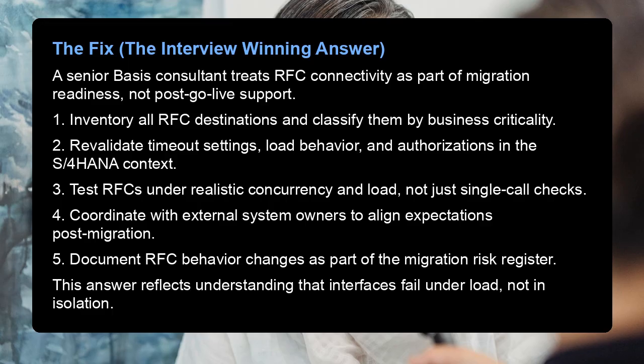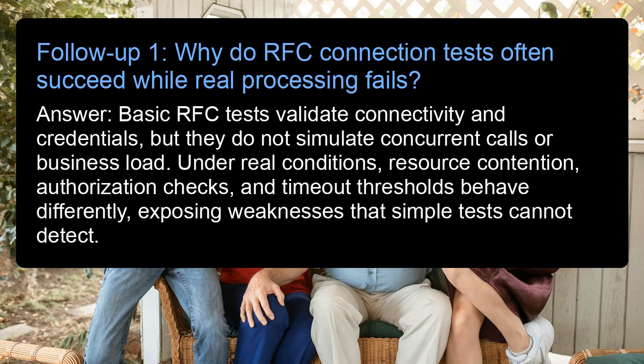This answer reflects understanding that interfaces fail under load, not in isolation. Follow-up 1. Why do RFC connection tests often succeed while real processing fails? Answer: basic RFC tests validate connectivity and credentials, but they do not simulate concurrent calls or business load. Under real conditions, resource contention, authorization checks, and timeout thresholds behave differently, exposing weaknesses that simple tests cannot detect.